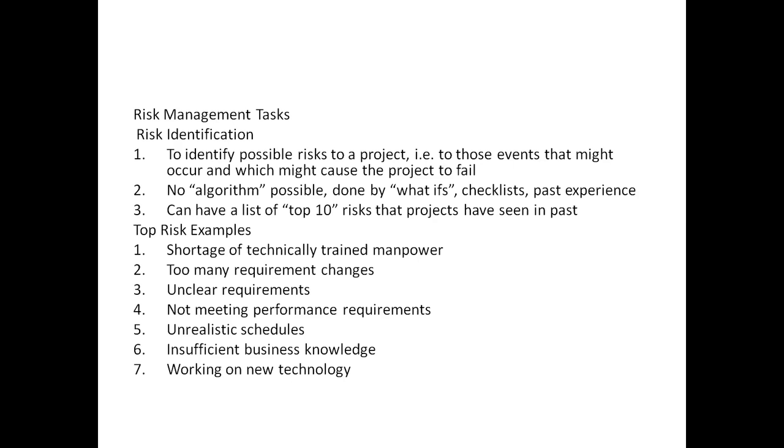Risk exposure has a formula. Risk exposure is equal to the product of probability of risk materialization and loss incurred due to the unsatisfactory outcome.